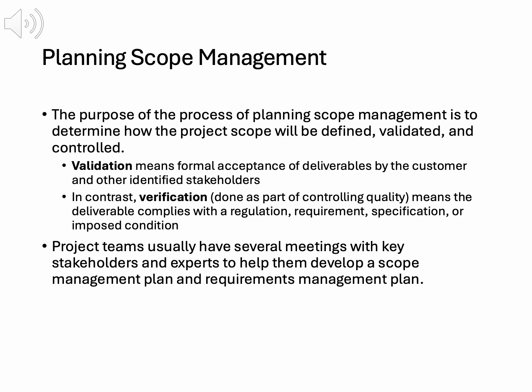Key processes in the scope management plan include preparing a detailed project scope statement, which defines deliverables and acceptance criteria. Creating and maintaining the WBS ensures all work is accounted for.